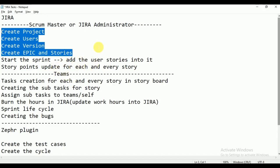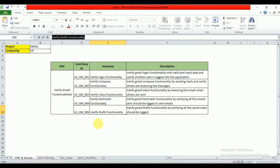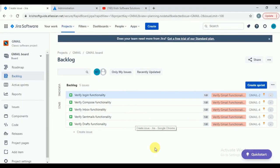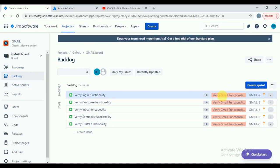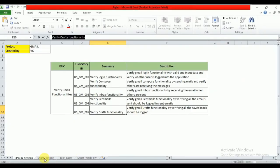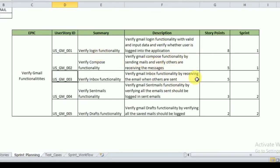The next part is starting the sprint, adding user stories into it, and updating story points. Sprint duration is usually two weeks; sometimes three weeks depending on the stories. The scrum master will click on 'Create Sprint' in the backlog. Once you've created the sprint, you need to move your stories into it. In the sprint planning meeting, they decide which user stories to pick up for that sprint.